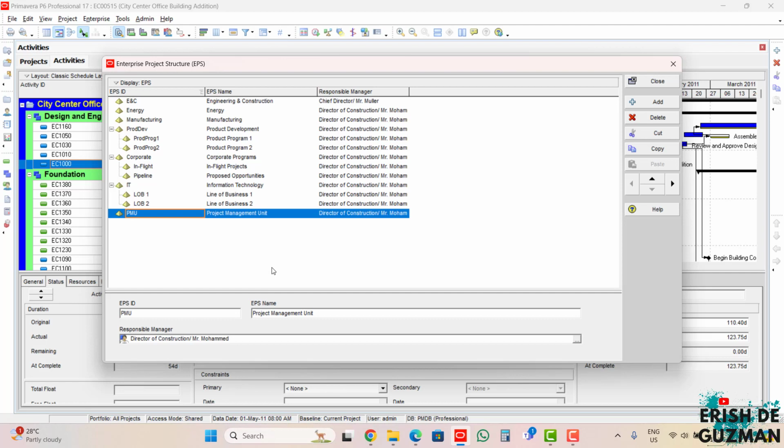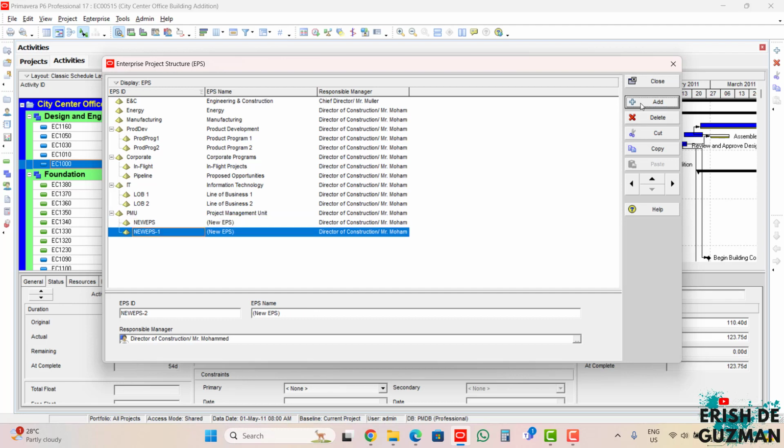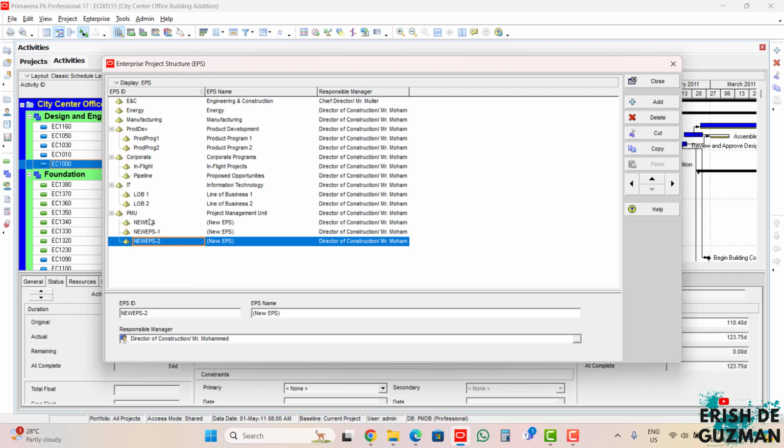Again, we just have to disregard the responsible manager for now as we will discuss it in a future tutorial video. And under the PMU EPS, or the Project Management Unit EPS, we will add another 3 EPS. These 3 EPS will be under PMU and this will be level 2. 1, 2, 3. Okay, so these are all under the PMU.